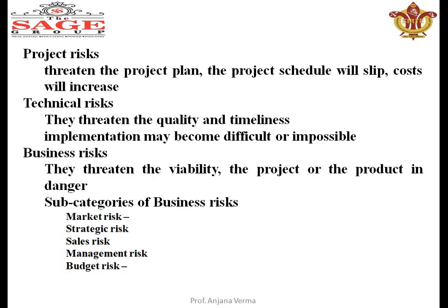After that, project risk threatens the project plan — schedule and cost will increase. That is the project risk. Technical risk means quality and timeliness become impossible and difficulties are coming in technicality. Business risk comes in many ways. When our product is going to be delivered, which type of risk will come? Market risk — when we planned, the market was not that high, but now it is. Strategy risk, sale risk, management risk, and budget risk. Our product may be expensive and a cheaper competing product may come, so our product is not selling. These are the business risks.